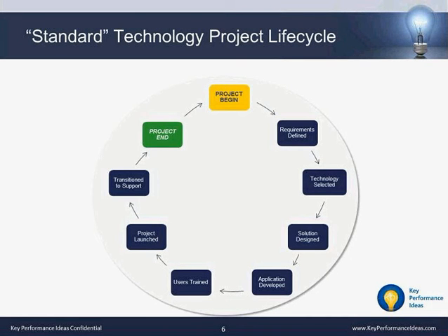So, the standard technology project lifecycle. A project begins, requirements get defined, a tool is selected, a design is put in place for that technology, the application is developed or coded, users get trained on the application, the project gets launched, and then it's transitioned to a support organization, and then the project has been completed.